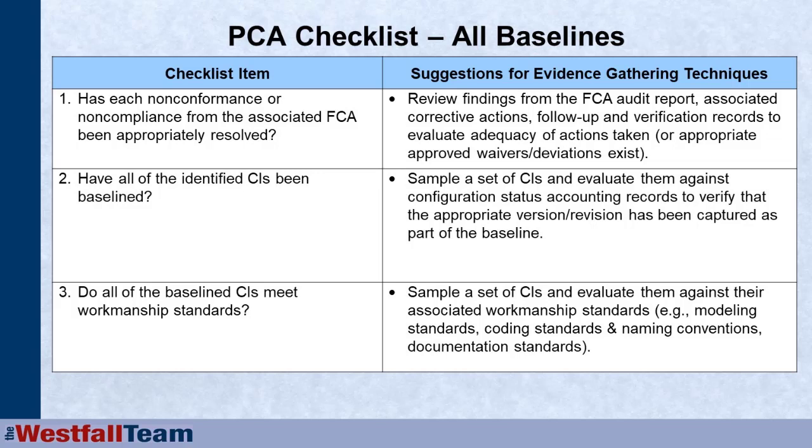So we're going to review the findings from that functional configuration audit, the associated corrective action records, the associated follow-up from that audit, and the verification records on the successful implementation of that corrective action, and make sure that the corrective action was adequate.